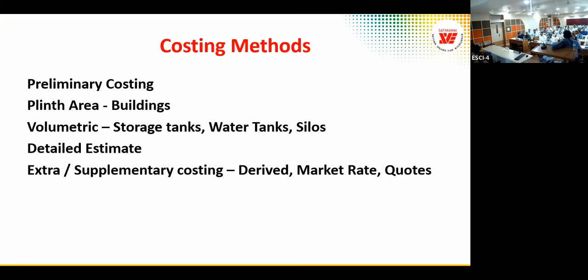Market quotations are allowed only for certain patented items. Correct. Certain vendors don't share the technology, so you have to get a quote from the vendor. You can't do the rate analysis for such items.